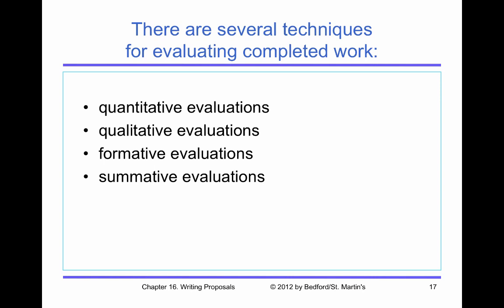Formative assessment helps to shape the project along the way. So maybe you're going to promise them periodic status reports. Those update them on the project and let them know how things are going. But they're also kind of reflective, in that they inform you about how well things have been going and whether you need to speed things up or what. Summative evaluation is at the end, that maybe you're going to promise them a detailed report when this project has been completed.